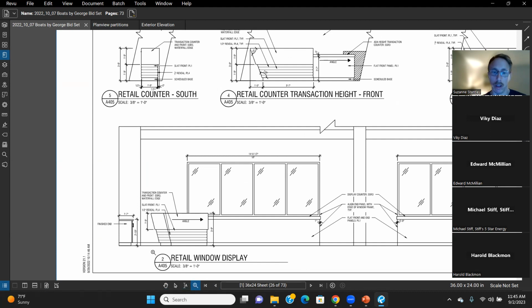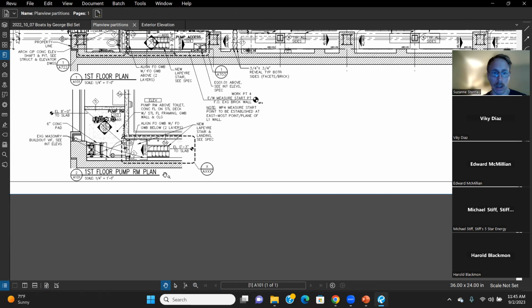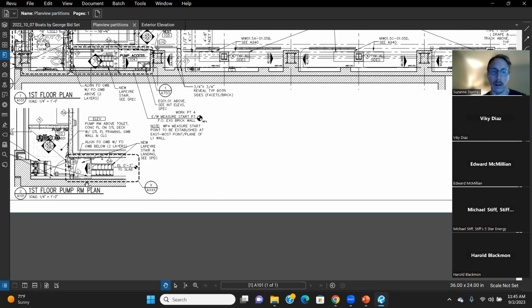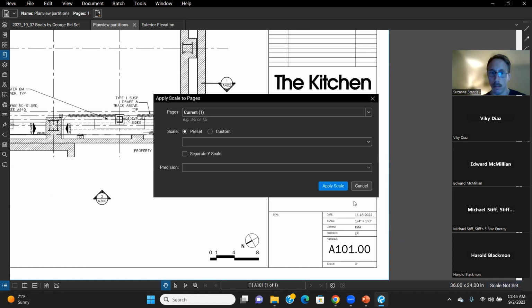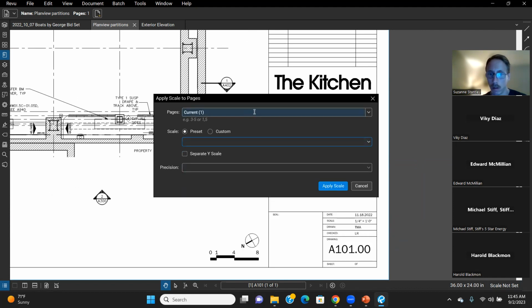Oh yeah, that's something we covered Wednesday, is finding your scale. It's pretty much always going to look like something like this, going to be under it. So these little guys, each one has its scale. The plan views will have one overall scale. Again, these are completely different drawings, different engineers. It's always shown pretty much the same way, either under the drawing or, very occasionally, actually, this one's got it both. So there you go. Sometimes it's down here, sometimes it's over here, sometimes it's both. But always be checking scale. And for me, that's set down here. Just gonna do it again. We're getting into estimating and takeoff, but what did I say? I already forgot. Quarter inch.